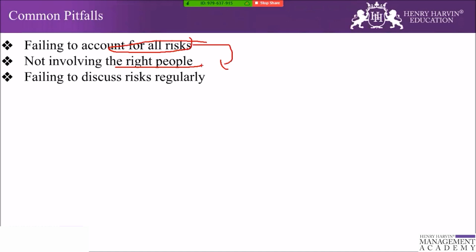So if we draw a conclusion from what we have discussed so far, risks are just as important to identify and deal with on an agile project as they are on any other project. Fortunately, there are many tools available to help the agile project as well. In addition to the risk adjusted backlog, there is also a risk burn down chart, another popular tool which is similar to the sprint burn down chart, but instead showing the impact of the risk over time. Whether a team uses a burn down chart or adds risk to adjust their backlog, performing risk management is a key part of ensuring that the customer is receiving the value.